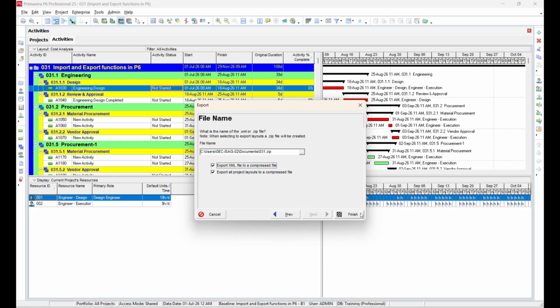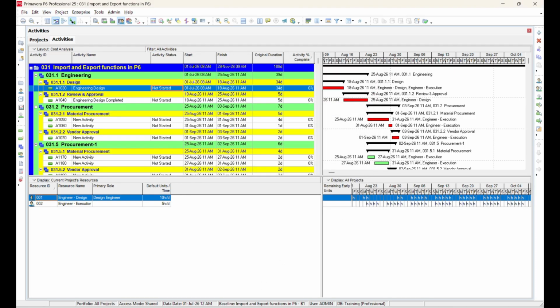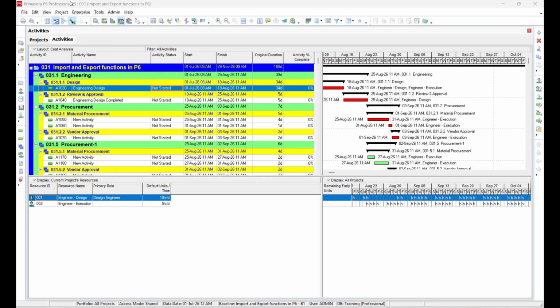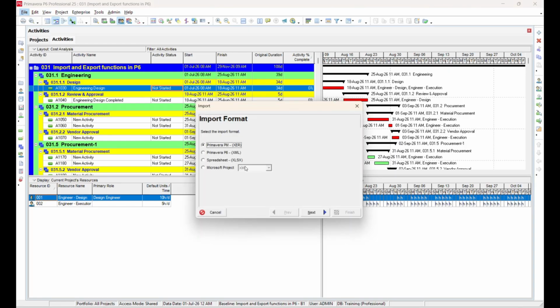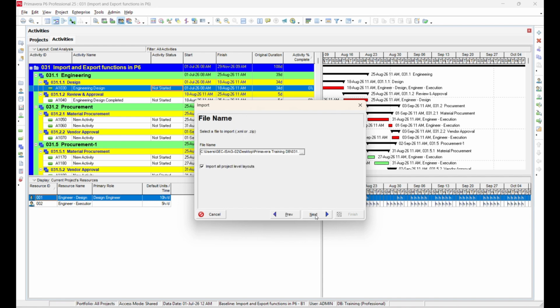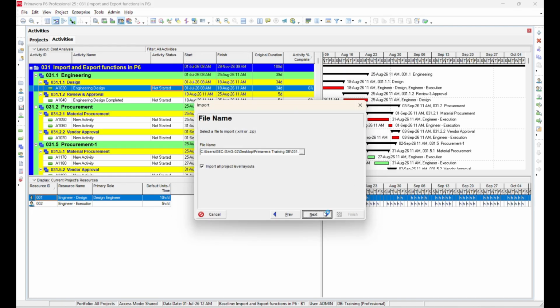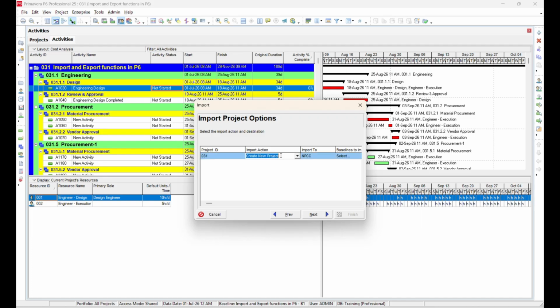You can also save the exported XML file as a zip file if required. Simply select the ZIP file option, choose the destination folder where you want to save it, and proceed with the export. The rest of the import process remains exactly the same as we discussed earlier. In the Import option, select the location where our file is saved. Here the real advantage is that we can select the baseline while importing our project. Choose the appropriate baseline, select other options, and complete.